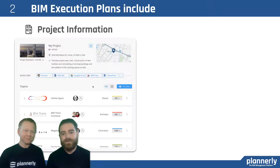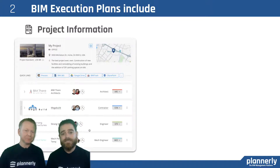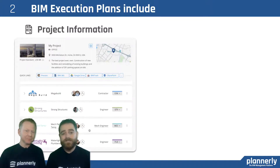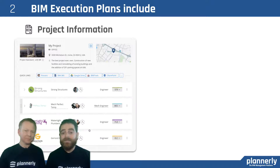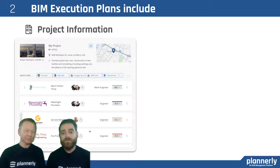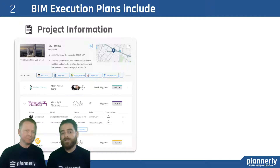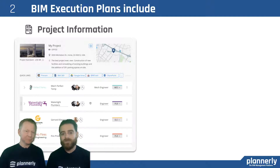A typical BIM execution plan would have anything from project information and the contact team list details, even links to other web applications or just sharing where all of the files or models are stored.